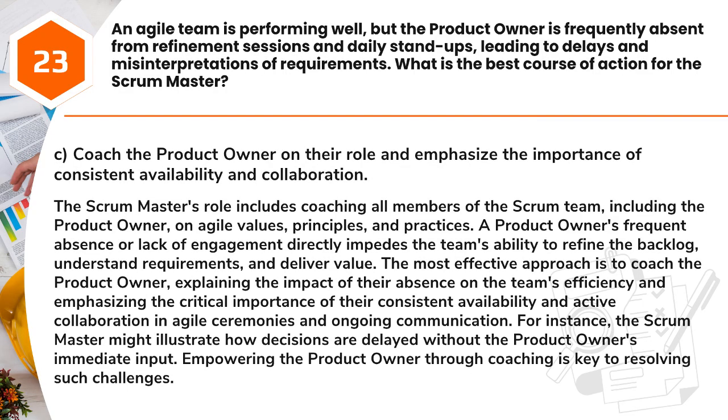Answer, C. Coach the product owner on their role and emphasize the importance of consistent availability and collaboration. The Scrum Master's role includes coaching all members of the Scrum team, including the product owner, on Agile values, principles, and practices. A product owner's frequent absence or lack of engagement directly impedes the team's ability to refine the backlog, understand requirements, and deliver value.